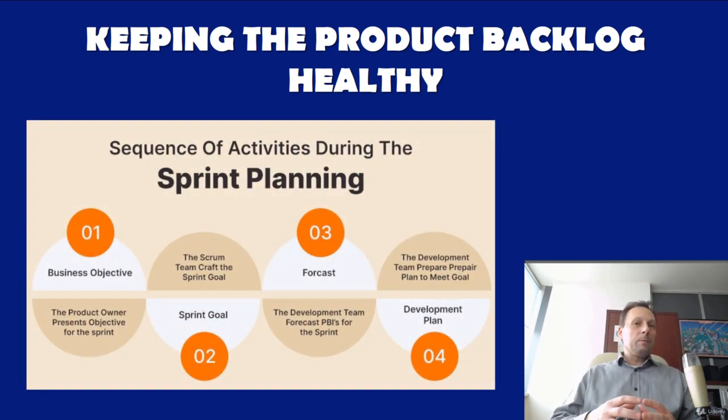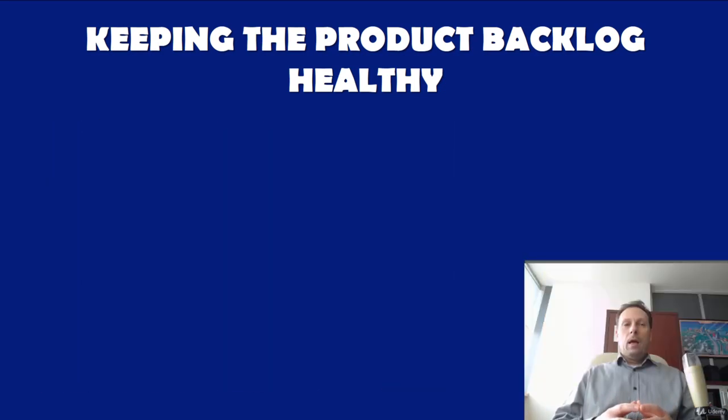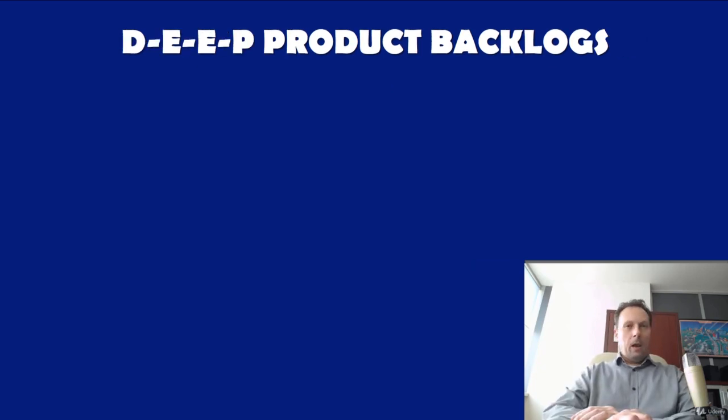All work items should be included in the backlog, from user stories, bugs, design changes, technical debt, customer requests, action items from retrospective, etc. This ensures everyone's work items are included in overall discussion for each sprint. Team members can then make trade-offs with the product owner before starting a sprint with complete knowledge of everything that needs to be done.